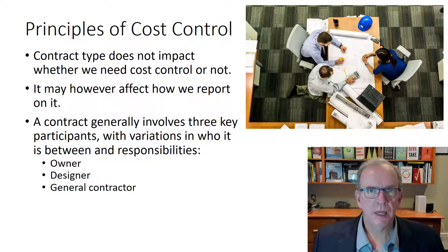If it's a cost plus, it may be that we're doing it so that if we're audited by the client or the customer, we have everything clear, we can show where the costs are, etc. And then we can do our markups and our profit add-ons based on our contracts. It all depends on the type of contract and what we're responsible for, but nevertheless, you have to be able to monitor the costs. And in some cases, you have to be really, really detailed in that updating process, because it may be very closely reviewed, as we'll learn in later lectures.